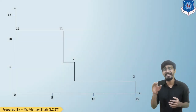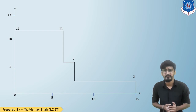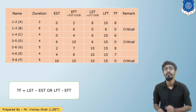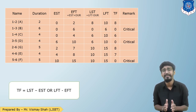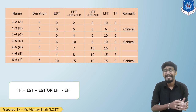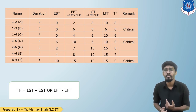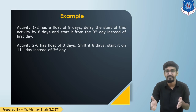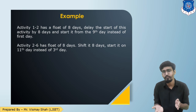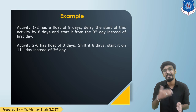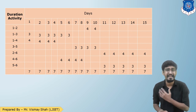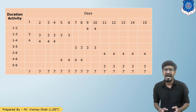As you can see, initially 11 masons are required, then 7 masons are required. Looking at the histogram, the peak is 11 and we need to minimize it to 7. Coming back to the table of floats, activities 1-2 (A) and 2-6 (G) both have a float of 8. So we delay these non-critical activities by 8 days: instead of activity first then float, we change it to float first (8 days) then activity. The reallocation table shows the updated mason schedule.